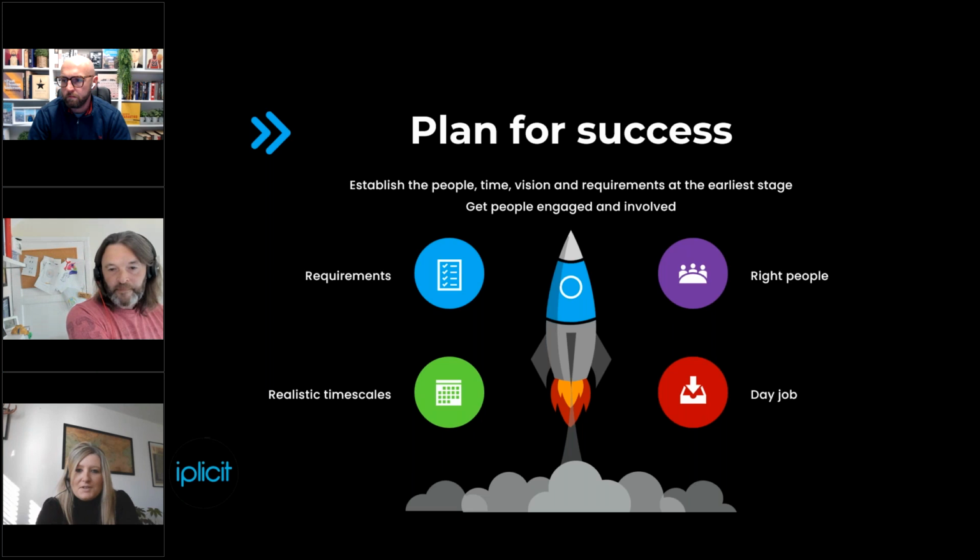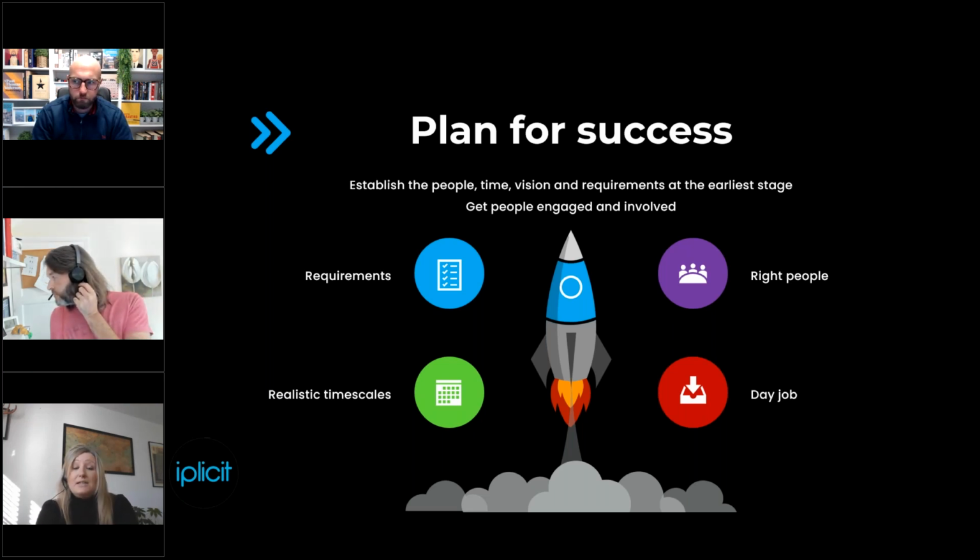At the end of the day, we've got to start with a good plan, right? So it's vital that we book in a project kickoff meeting, and generally that happens within 2 weeks after order. That starts our customer onboarding process. You have a meeting with your project manager, and during this meeting it's about gathering detailed requirements, setting expectations, and understanding your wider needs around why you're moving finance systems, what your current operational processes are, whether they are still fit for purpose, and whether your business is changing. So we don't just look at what you need right now, but what you are going to need in the future, so that we've got a finance solution at the end of the implementation that's going to scale with you as you grow your business.